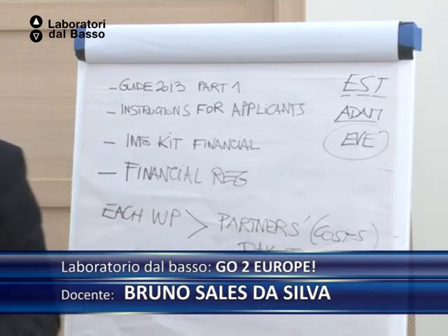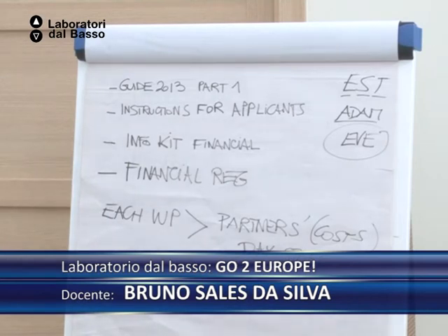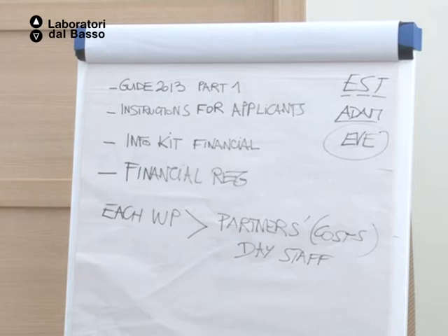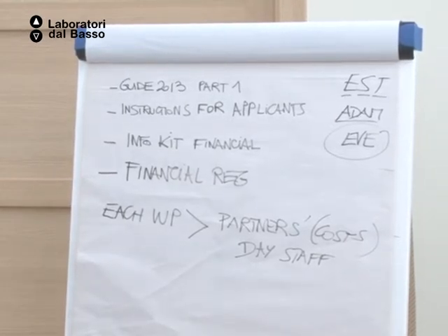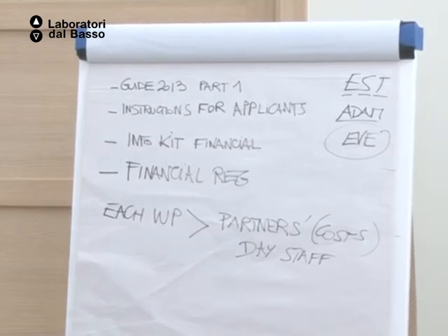One project, one grant, okay? Don't apply with your project idea to five and say, I'll choose the best. No, just one application. No profits, these are the key things. The project is a co-financing, and it's to be used to pay for things. At the end, you might prove that you saved money, and this money will not be given to you. If you have a grant agreement of 2,000 euros and you spend only 1,000 euros, you don't receive the other 1,000 euros. But since you're working on real costs and you're telling the truth, you're not doing anything wrong, everything goes well, okay?